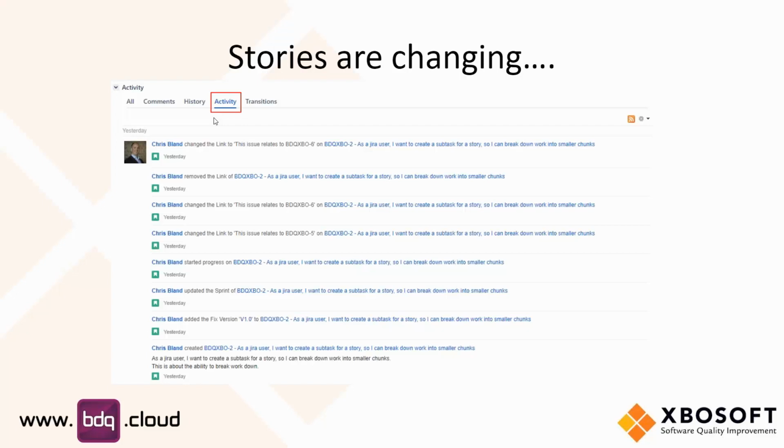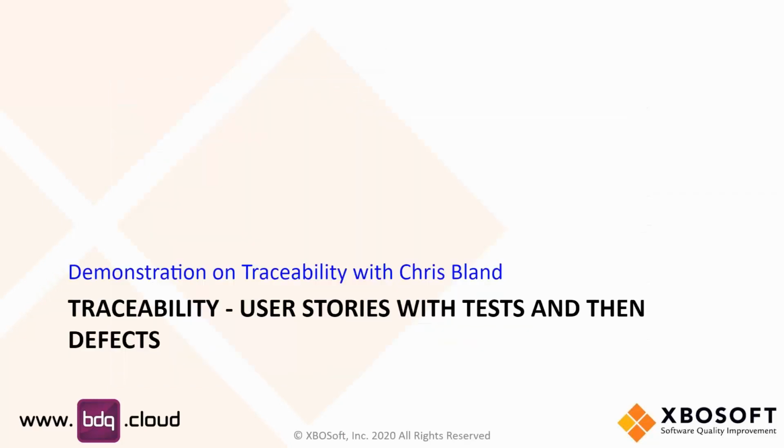Now, if that is not adequate, and it is for most people because you're doing 2 week chunks, one of our other partners does have a tool. It's called RMSys, which is a very formal requirements management system where you can really freeze requirements and freeze versions. Quite often popular with engineering companies, actually. So if the baselining with Jira is not enough, there are options to make it more robust. But of course, with that comes more process.